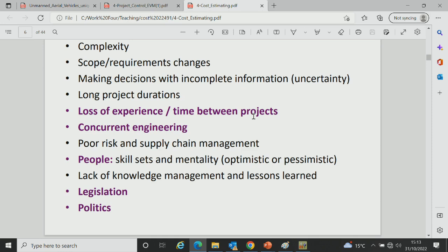The major cost driver in terms of cost increases is engineering changes. Every time you have to make a change in a project, you have to incur lots of change management processes, lots of redesign, lots of real disruption. And if you've got a complex project, there's a lot of threads to untangle to make that change. There's the famous thing with the Typhoon aircraft, where it's probably one of the most integrated systems in aircraft, although that goes against aircraft design principles in terms of what you want, which is modularity in aircraft design. What you need is something which is lots of independent parts. You want to minimize the number of dependencies in terms of electronic software, mechanical linkages, these sorts of things.